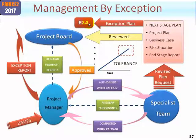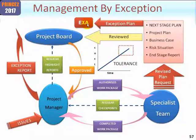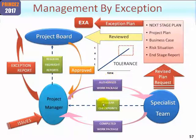This is now held at an exception assessment. The difference to an end stage assessment is that the project board need to authorize or otherwise this exception plan. If the answer is yes, they would again set new stage tolerance, approve the exception plan, and the project manager would now give out new work packages based upon that exception plan. Alternatively, the project board again may make a decision to prematurely close the project if they don't like what the exception plan shows them. Here it is being approved and the project manager is giving out new work packages.